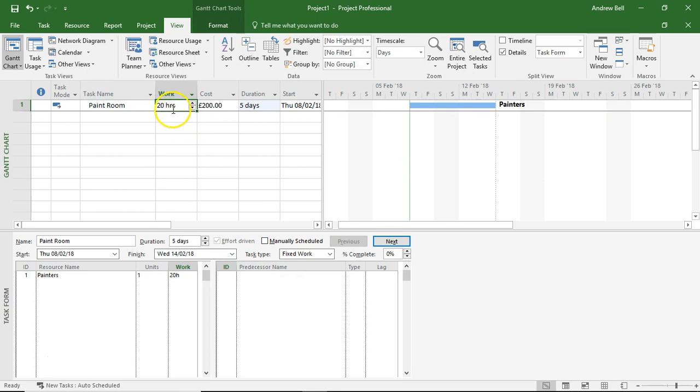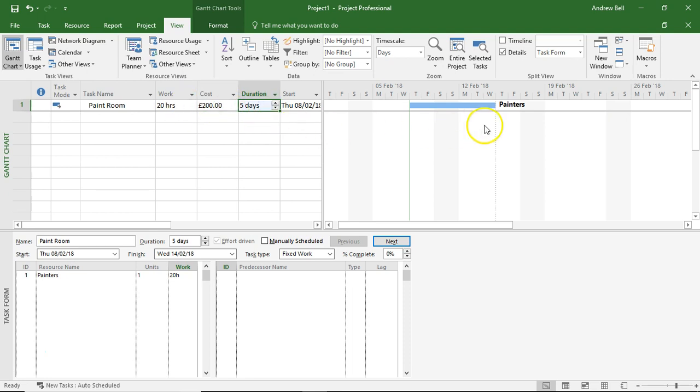There's only 20 hours of work in the task, so there's only a £200 cost. These painters get £10 an hour. But the duration showing on my Gantt chart is five days.